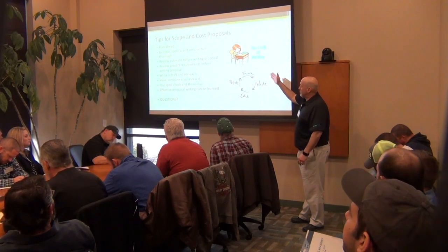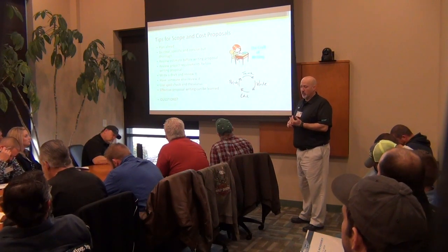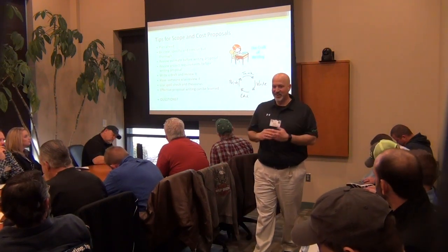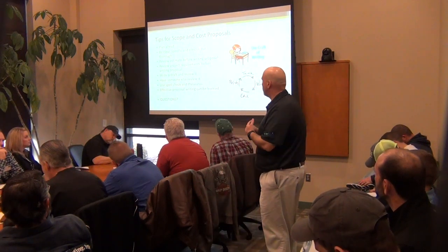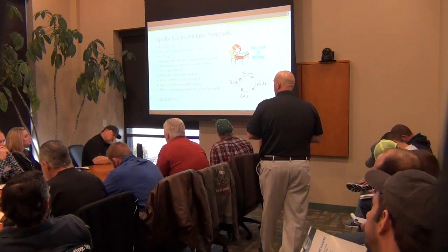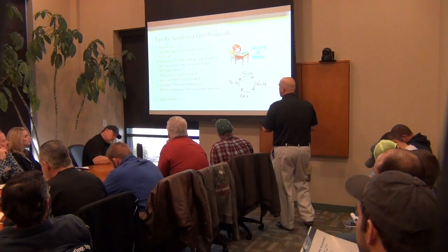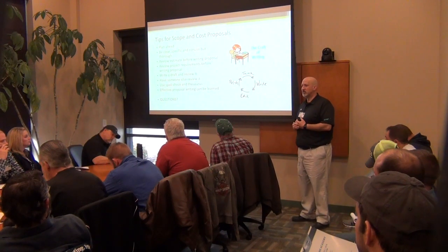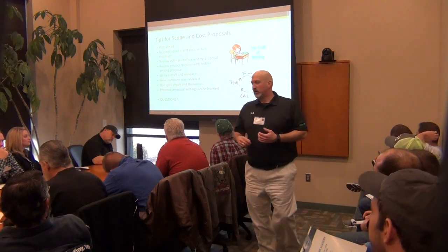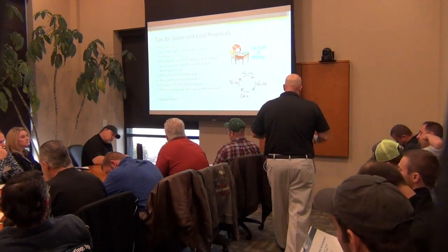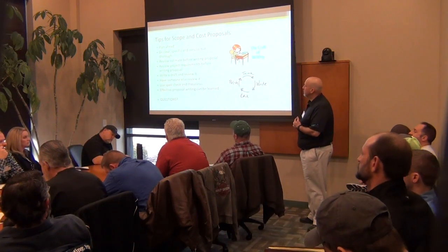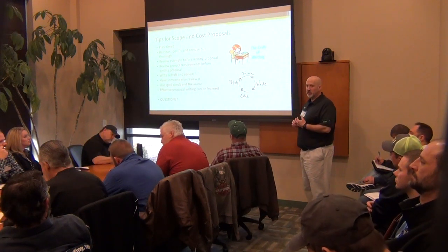And obviously review the project requirements before writing your proposal. Read the scope of work, the RFP, whatever the general contractor or owner sends you. And if there isn't one, then call them up and ask them. Say, hey, you want a price from me for masonry. Okay, well, what do you want me to cover? You want me to cover scaffolding, right? Is the general contractor going to keep my workspace clear so I have access? So you call them up and ask if there aren't any specific project requirements.